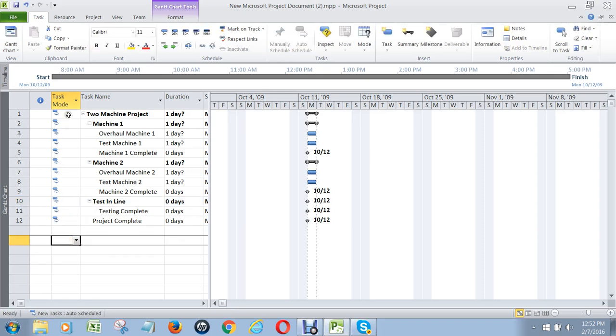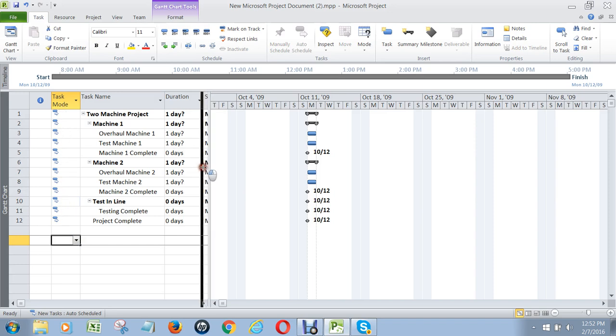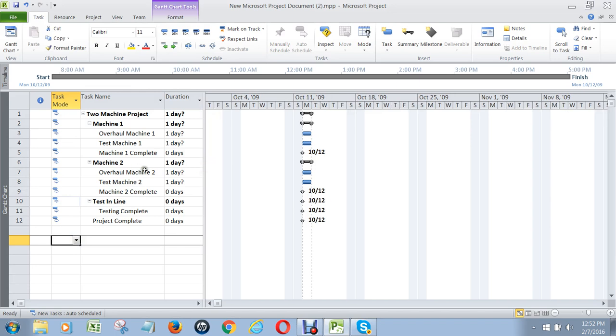You should never have any green icons in here. They should always look like the auto-scheduled icon. That's another mistake most people make when they're new to Microsoft Project.